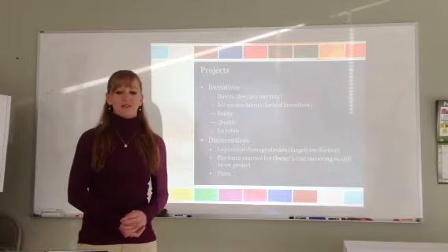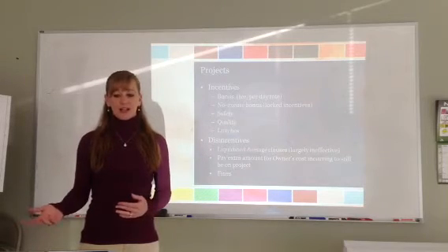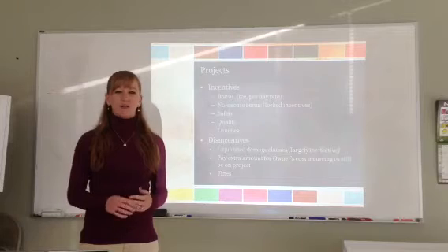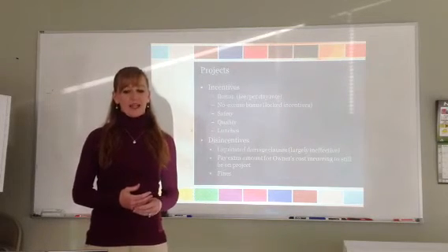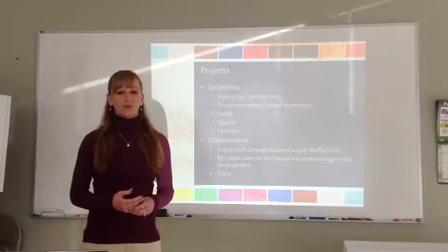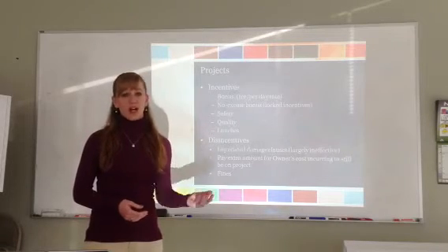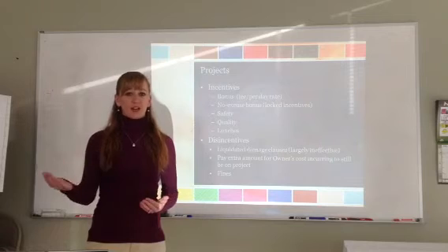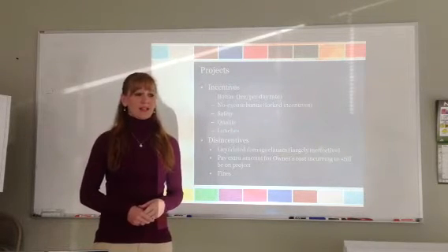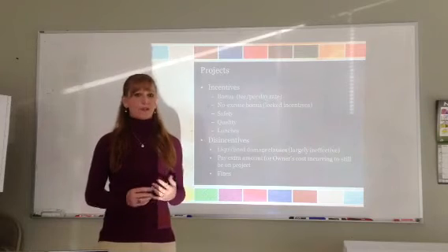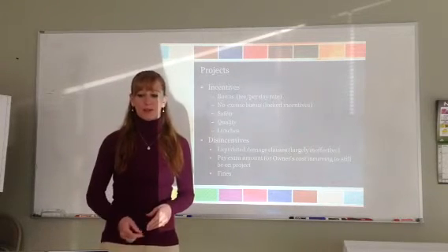Some disincentives may be liquidated damage clauses in the contract. However, the research article I looked at mentioned that it was largely ineffective in that case. You can also be paying the extra amount for the owner's costs that they incur for every day longer that the project goes on. And then there may be fines associated with government projects or different types depending on what you're working with.